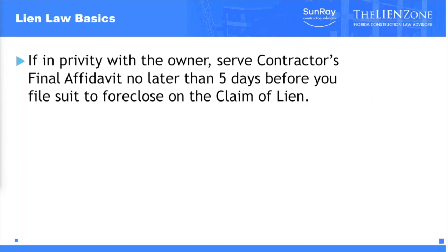And it's a document that effectively says under oath, I'm the contractor, you're the owner, I'm owed this amount of money, and these are the people that remain unpaid, and you'll list them.